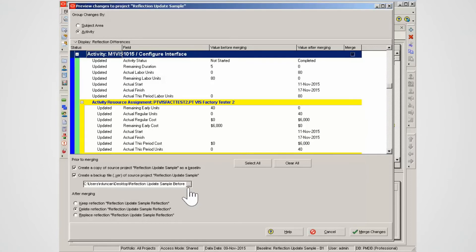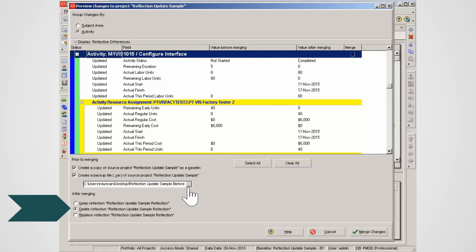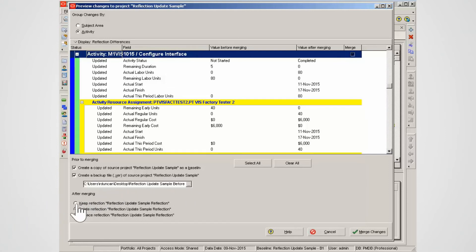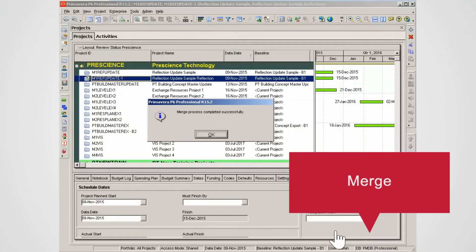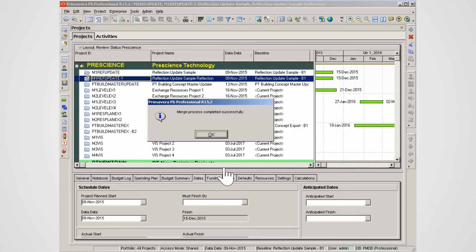After merging there are three options for the reflection project: keep reflection, delete reflection or replace an existing reflection project. Select one after merging option. Select merge reflection to execute the update. Select OK to close the update advice box.